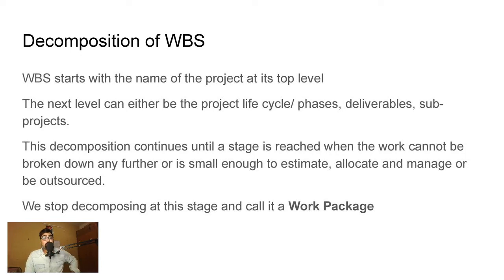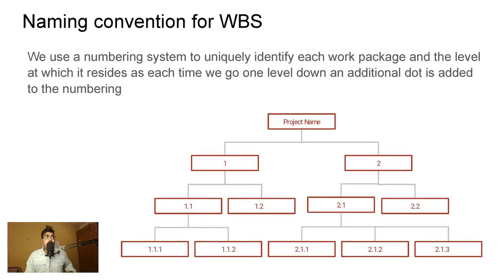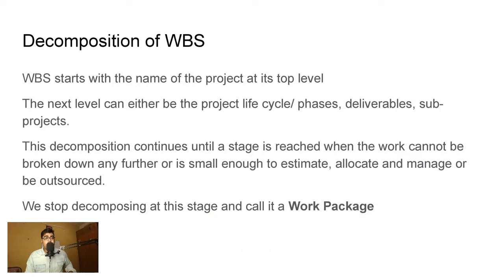It also says this decomposition continues until a stage is reached where the work cannot be broken down into any further small segments to estimate, allocate, and manage or to be outsourced. All right. This is where, if you can recollect, I was talking about the smallest segment that you can split the project activity into. That is the point where it becomes a work package. And that is what is given here. We stop decomposing at this stage and we call it a work package.